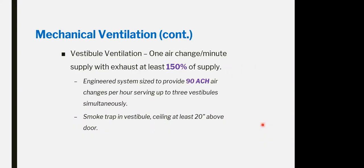And making a calculation for the staircase pressurization is part of your submission. Not only this one, providing a case calculation for the staircase and the simulation for 1 open and 2 open and 3 open. Okay, you have to submit calculation and physical simulations. You will inspect it during the testing, to maintain the pressure for the stair pressurization. You can maintain the pressure either electrically through the VFD or by providing mechanical pressure relief dampers.